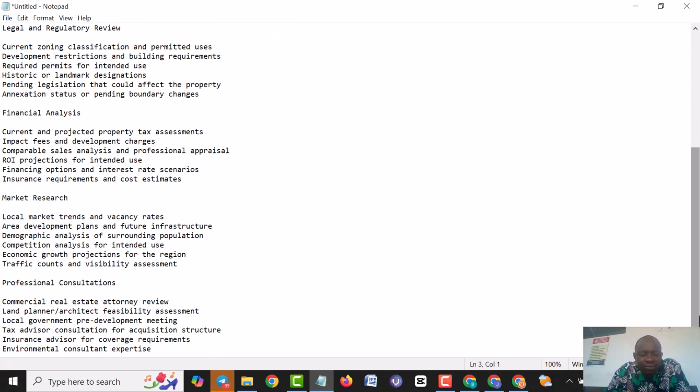Under financial analysis, we're talking about current and projected property tax assessment, impact fees and development charges, comparable sales analysis and professional appraisals, financing options and interest rate scenarios, and insurance requirements and cost estimates.